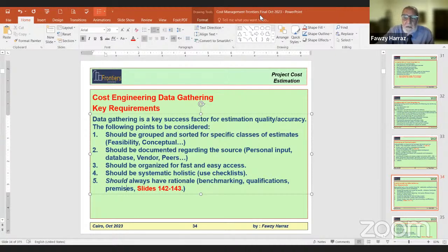This is a disruption to the project execution, but God is the almighty, there is no other way. This contractor will not continue the project based on your project requirements, specifications, quality, and so on. He cannot spend from his pocket. So in this case, the mandatory option is to terminate him and bring the second bidder. Maybe the second bidder will cost more: if the remaining part costs, say, 500 million, the next bidder may say I need 600 million. You can apply the clause to take this additional cost from the performance bond. And that should be clear in the working of the scenarios of the suspension and termination clause.